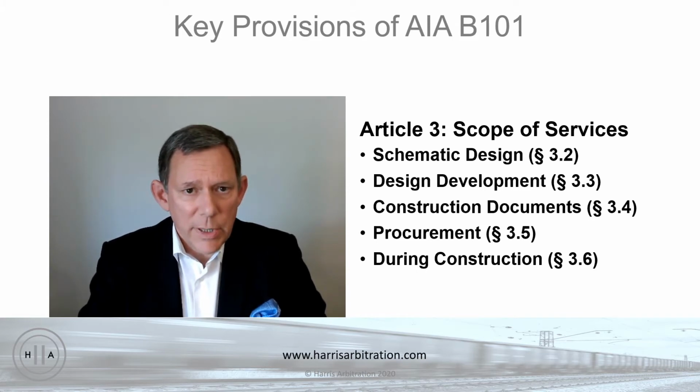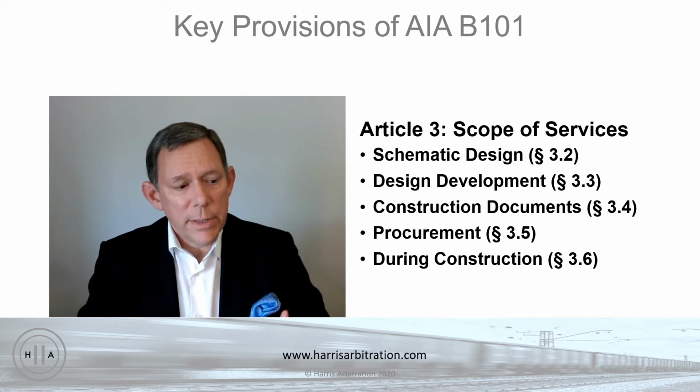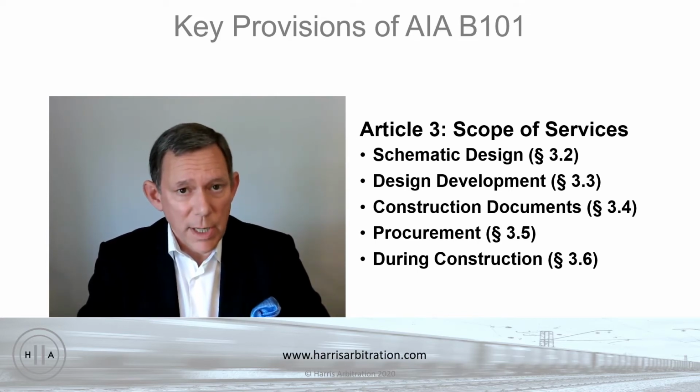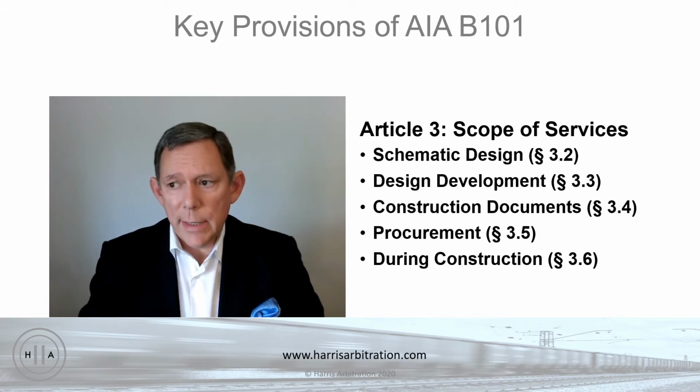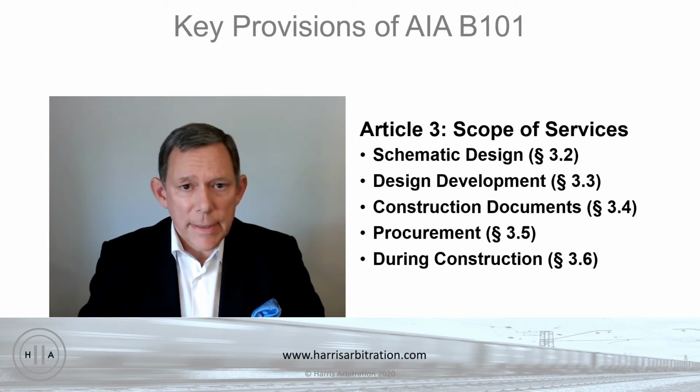Then the final step in that design process is to come up with the actual construction documents. That is, the plans that the owner will put out to bid to different contractors, that the contractors will study in order to prepare their bids, and that ultimately can be used to construct the project. And these will consist of a whole series of different categories of design documents. There'll be things like mechanical drawings and electrical drawings, structural drawings, things like this, as well as the specifications of materials, etc.